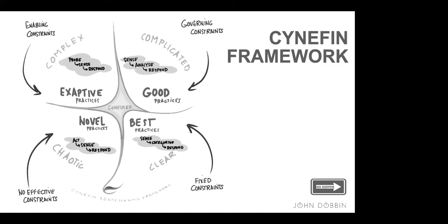And so if the technology problem that we're trying to solve has got moving requirements, unknown things about the technology, unknown things about the business processes that we're trying to do, when there's lots of unknowns, we want to use agile processes in order to probe and sense as we are going. So that's the most important quadrant.